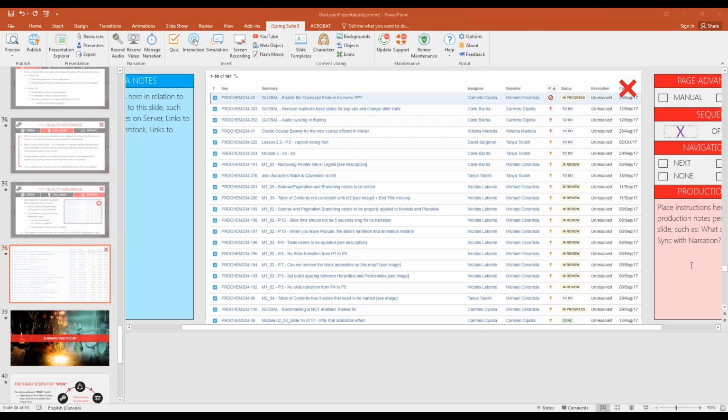So they're getting used to how to leave the Flash environment and go to a more, I would say, simple one, because it's a lot faster once you get the hang of it. So our next course, which we've kicked off like this for biology, we have a budget of 1,000 hours because it is a 10-week course instead of a 13-week course. And so far we are in budget and we still have about 300 hours left.